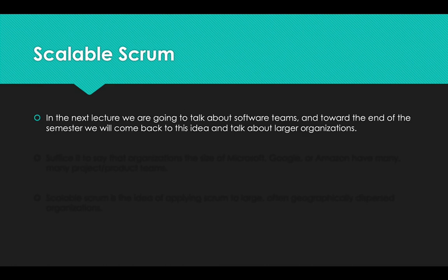What you're going to find out through the next video and that subsequent discussion is that Scrum is great for 5 people or 6 people. When you get to 45 people, or you get to a dozen geographically dispersed Scrum units, it's extremely difficult to try to synchronize all of their impediments and all of their knowledge and communicate efficiently across time zones or across vast distances of space.